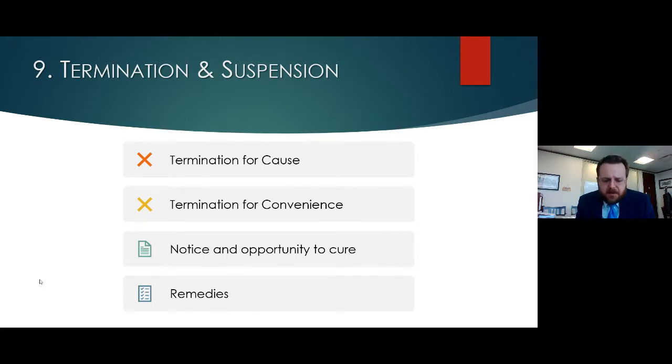So here, an example from case law I think is warranted. This is a case in Florida, and it says that a contract required a written notice of breach and opportunity to cure. The owner gave a written termination letter. So this is talking about a prime contract where the owner terminated the GC, but it's going to be applicable to you terminating as well.